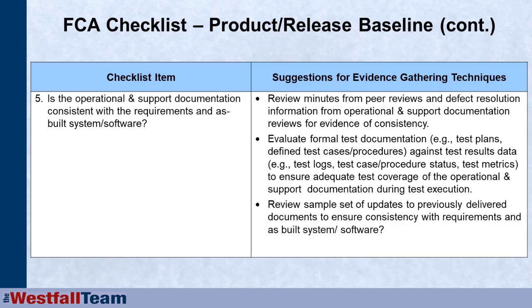Is all the operational and support documentation consistent with the requirements and the as-built document, as-built software? Now we're going to be looking at review minutes from the peer reviews and/or defect resolution minutes from the operational and support documents for evidence of consistency. Did we correct everything that we identified in the peer reviews?